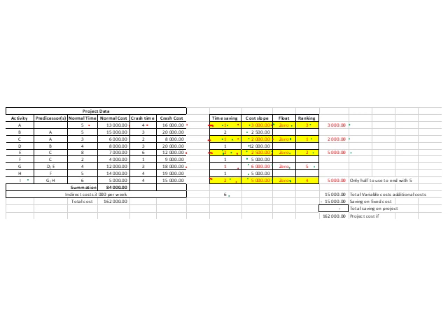Our next ranked item is item I, and we only have to save 1 week here. Thus we don't multiply it by 2, we only multiply it by 1, so we have an additional cost of 15,000 rand if we add all of these together.